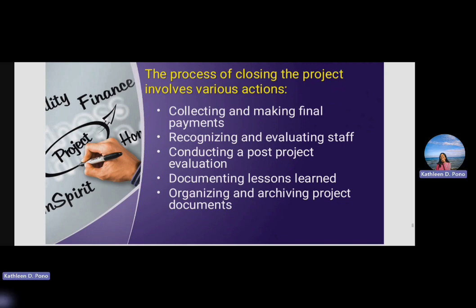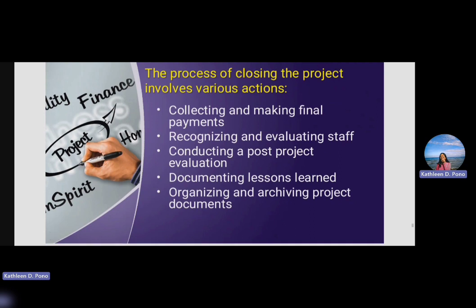Lastly is organizing and archiving project documents. This means ensuring that all project documents and records are properly organized, stored, and archived for future reference. The actions involved may include developing a project archive plan, creating an electronic or physical archive of project documents, and ensuring that all stakeholders have access to the archive as needed.